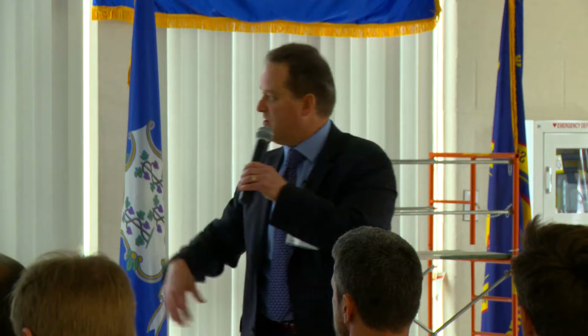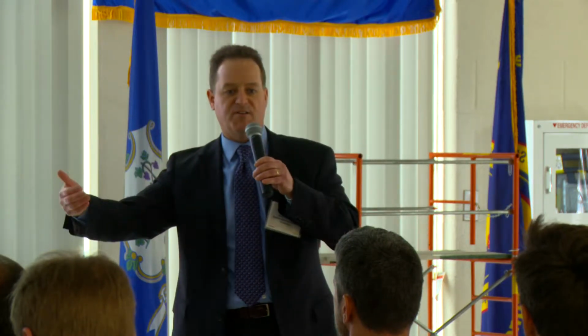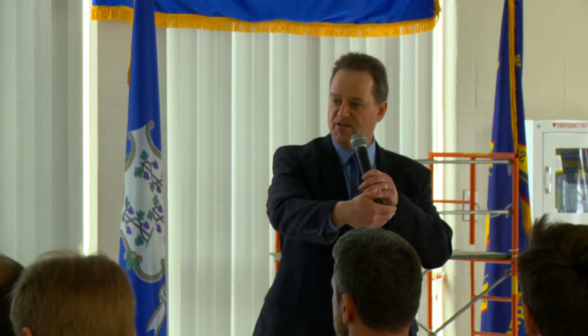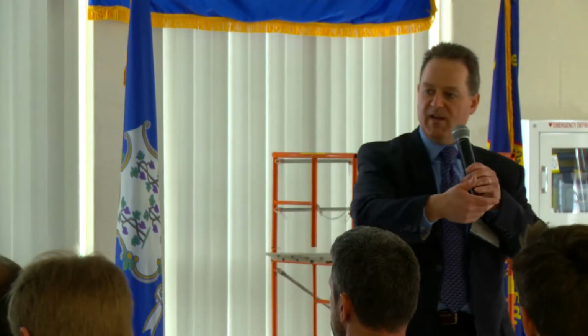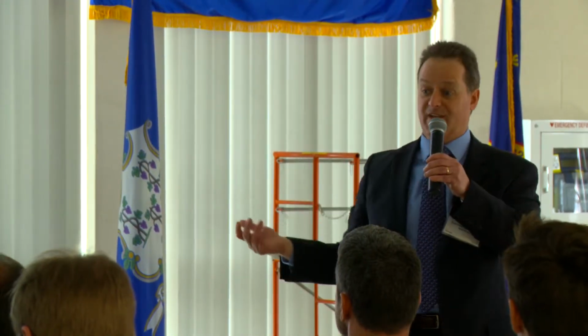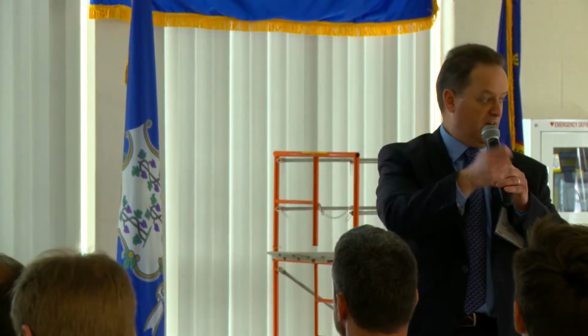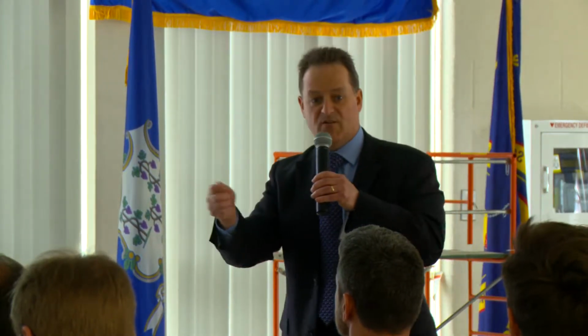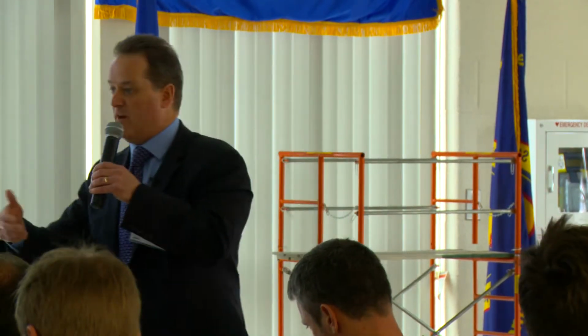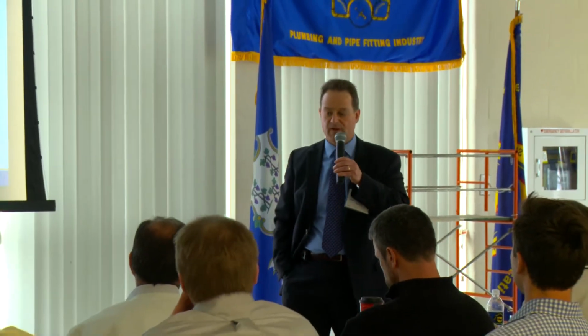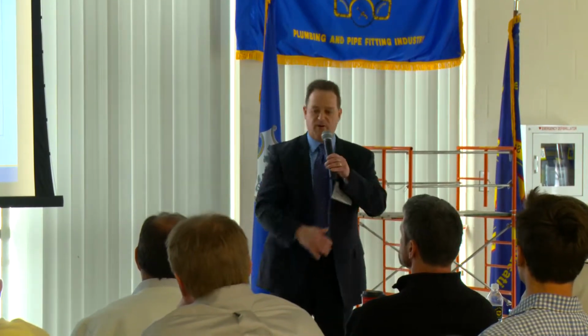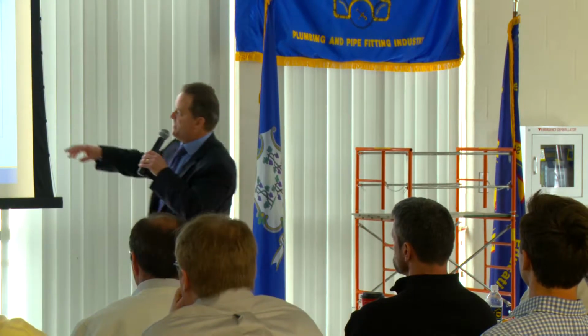I'd say certainly projects that have multi-ECMs involved, it's not uncommon for the contractor, ESCO consultant to prepare 2 or 3 project scenarios to go into that conversation with the owner, right? Anticipating that the building owner is going to have some what ifs, right? And the ability to say right on the spot, well, here's what we've anticipated a few of your what if questions. Here's how it changes the metrics on the way you would view this investment, right? And that'll become a little bit clearer in a moment when we get into the reporting. But that's a key metric.